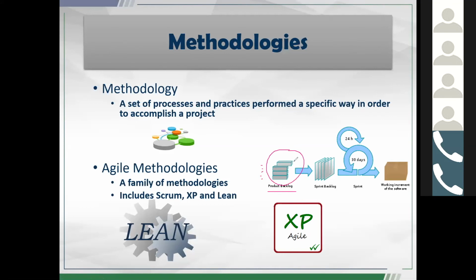So this top block, which is called a backlog item, product backlog item, PBI for short, is the highest priority item, the list of items that we need to work on. So it's a chunk of work. That product backlog item, PBI, is a chunk of work, what is traditionally in project management called a work package. And it has been prioritized with a business mindset. So that first chunk of work, that first backlog item, is the most valuable work that would be delivered on this project, the most valuable features and functionality. And as we work down the list, the remaining items would be important and valuable, but less valuable than the higher product backlog items.